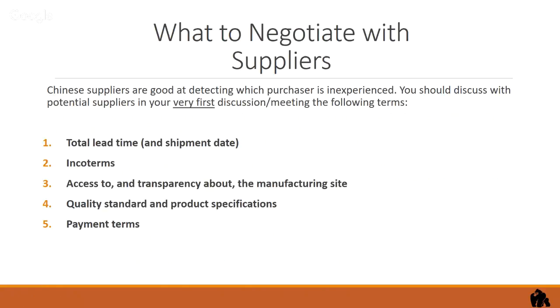your lead time. Can you imagine if you've got a silicon mat, and they make the silicon mat and don't do any printing whatsoever? They have to subcontract that work out, in other words, send it to another supplier to do all of the printing. So you got the answer from them: when we make them, it's going to take 10 days to produce your mats.